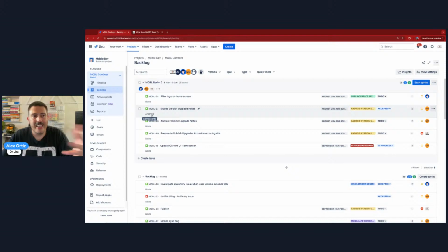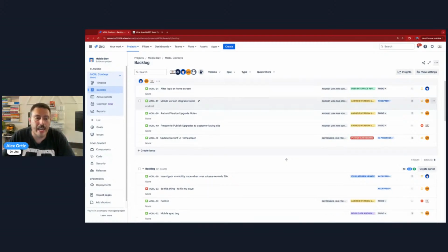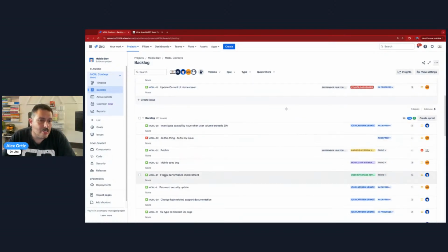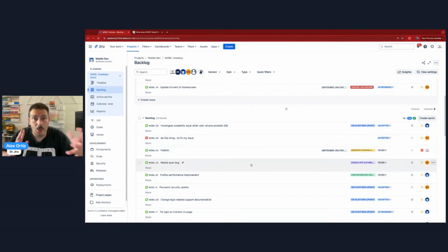So when, again, I'm negotiating and we're trying to figure out, is this the right thing we're supposed to be working on? Was this system critical? Maybe you're system driven, right? Maybe you're trying to fix a specific system and get that all polished. Well, you can see those components in your card. So when you're planning the work, you can sort or at least look at your items that belong to a specific component, that belong to a specific release, that belong to a specific epic, that belong to a specific priority. And you can really now, using facts and data, negotiate this order.